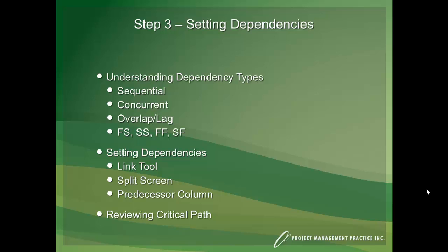You may have concurrent where task 1 and task 2 can happen at the same time before task 3 can start. Or you may have some overlap scenarios where task 1, halfway through completion, you can start task 2 or halfway through task 2, you can start task 3.